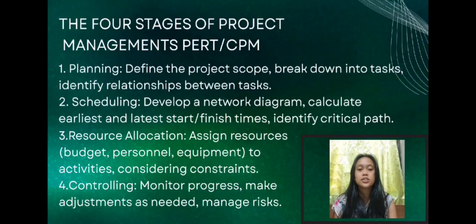Second is scheduling. In scheduling, you create the network diagram, calculate the earliest and latest start and finish times, and identify the critical path.